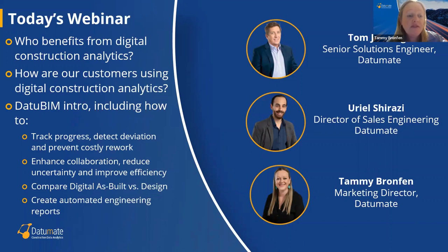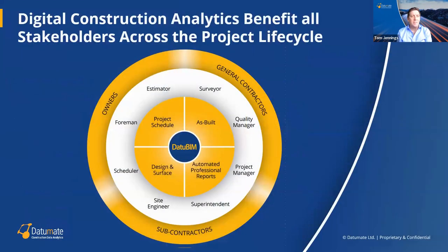We're going to start off with real-life use cases. Digitizing infrastructure construction analytics is beneficial for almost all stakeholders across the project lifecycle, whether they belong to the owner, general contractor, or subcontractor. These stakeholders will see improved collaboration, increased time savings, decreased risk, and greater efficiency. WRS found that by flying the site using an RTK drone, they were able to decrease risk by keeping surveyors out of the way of heavy equipment. The drone data can be processed in hours and shared across the entire enterprise so decisions can be based on real-time data.